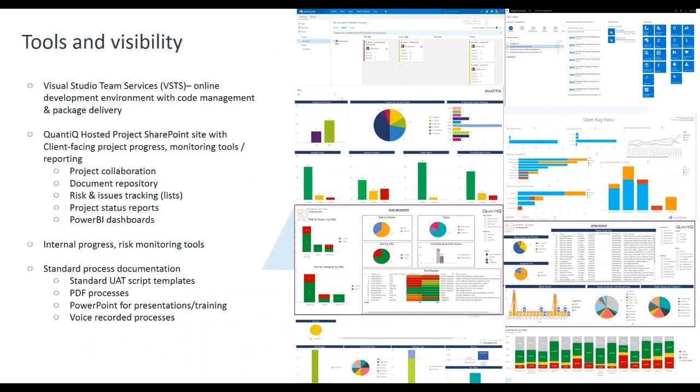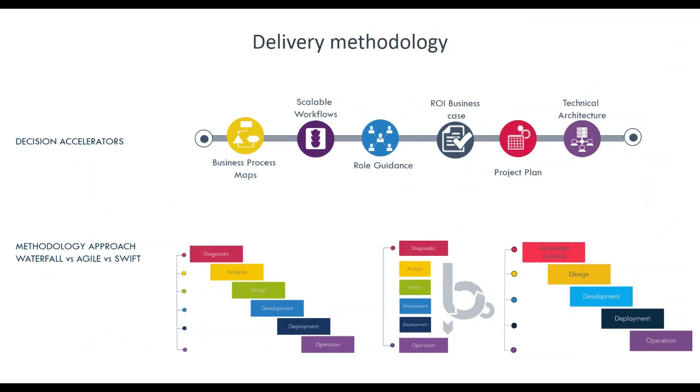The Quantic delivery methodologies are a prescribed set of methodologies for deploying Microsoft Dynamics based on the SureStep methodology. It provides product-specific and general project-based timelines, workflows, process maps, and tools to assist the implementation. The fundamental differences between the methodologies are shown on the slide, but in summary, Waterfall is a more traditional approach where we take the client through each of the project phases with stage gates to close a stage before commencing the next.